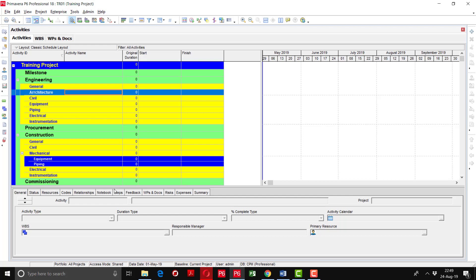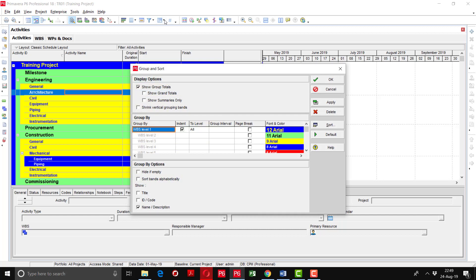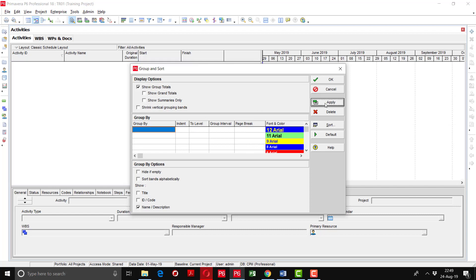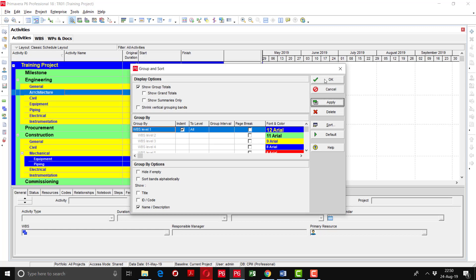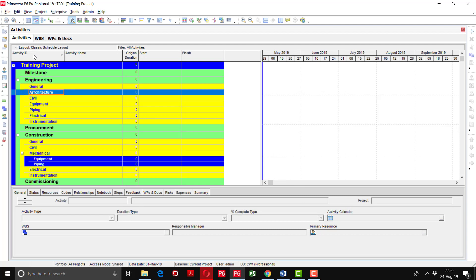First, we have to organize the layout based on the WBS and sort by Activity ID. Select the layout by WBS — you can see it has already been organized by WBS. If it is not organized this way, the WBS window will disappear and appear blank. To organize by WBS, simply click W, select WBS, and apply. Also ensure activities are sorted by Activity ID, indicated by the downward triangular button.